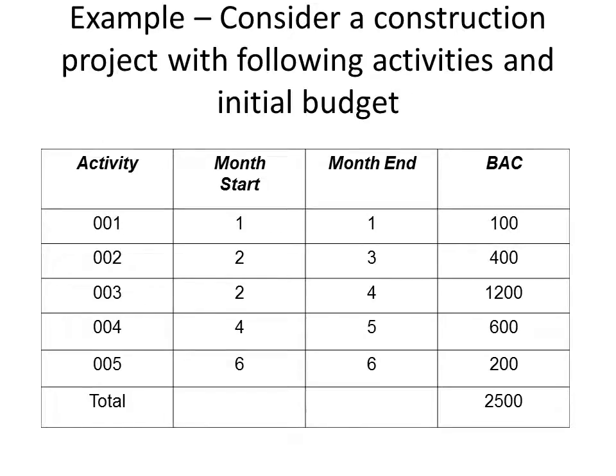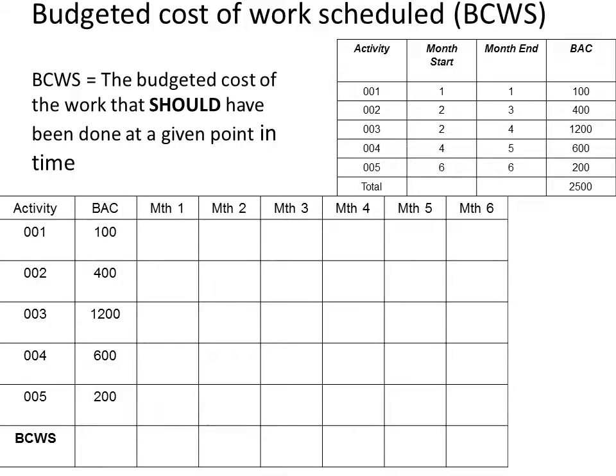Now let's take an example to make earned value management and key calculations more clear. Consider a construction project with five key activities and an initial budget. Activity one starts and finishes at month one with a budgeted cost of $100,000. Activity two starts at month two and finishes at month three with a budget of $400,000. The total budget for this project is $2,500,000.